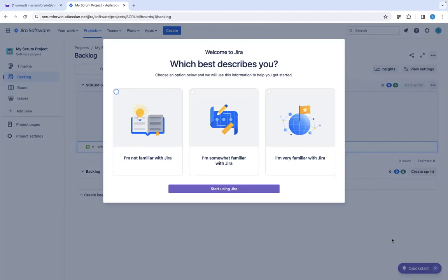Typically in Kanban, you'll have it set up so that there are things that are to do, things that are in progress, things that are done. So you want to have WIP limits, which is work in progress. Based on your team and how they get things done, they will know exactly how many things they can handle at one time max and still be effective. So let's say for your team, it's 5 things that they can have in progress and still be effective.